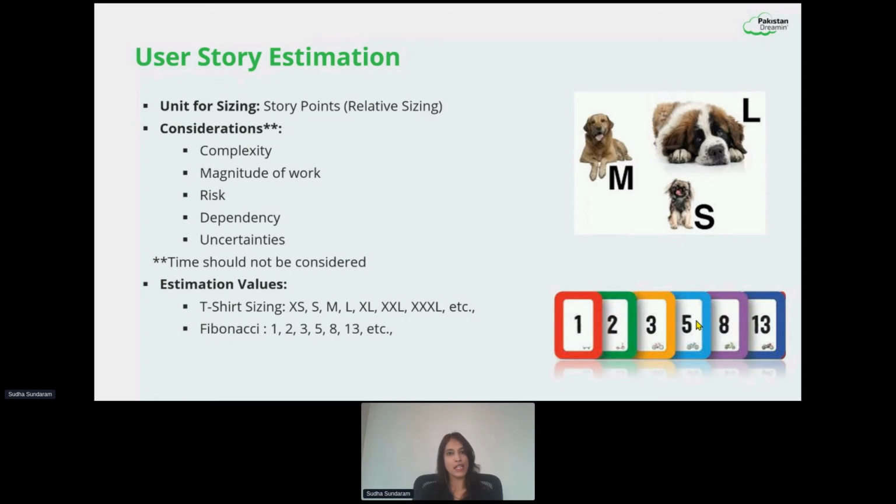So what relative sizing means is, say, for example, we are all part of the same Scrum team, and we have done a few sprints earlier, and the smallest ever story we have worked on has been a field label change, right? We had an opportunities page, we had something called a region, and we wanted to change it to zone because they just changed that terminology and they're calling it only a zone and it's no more called region in the company. So that's the smallest story we have ever worked on. We just have to go to one page layout of opportunities and change the field label name. And we did this way back in one of our sprints, and we were the same team working on it. So we know that this is the smallest ever story done by our team, right?